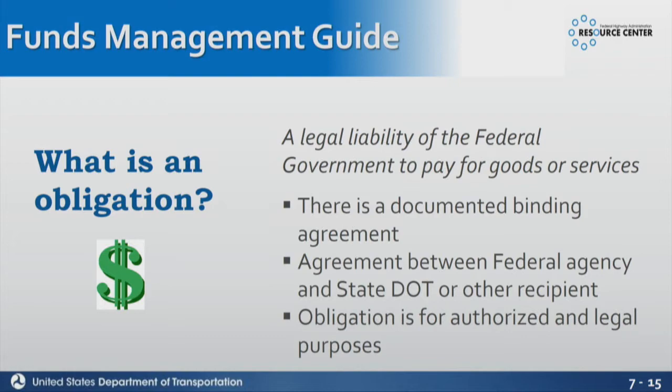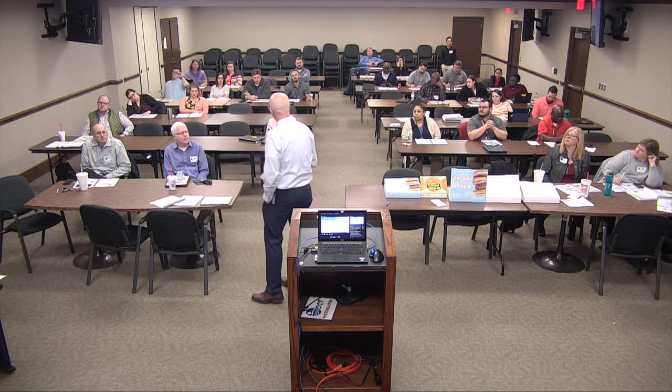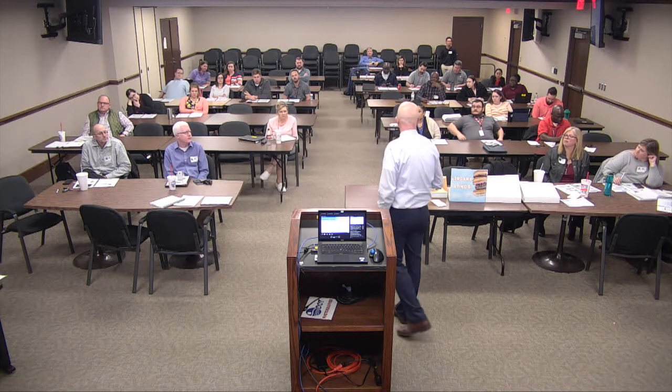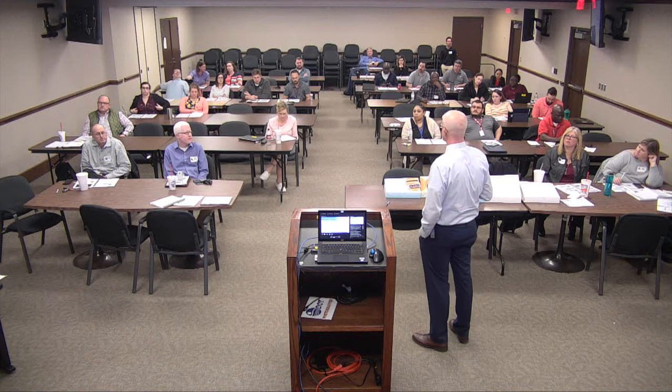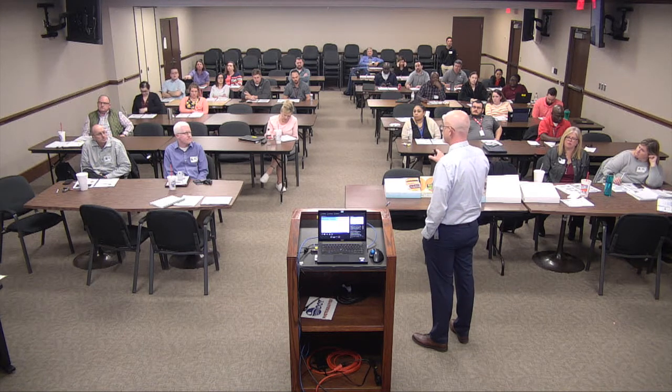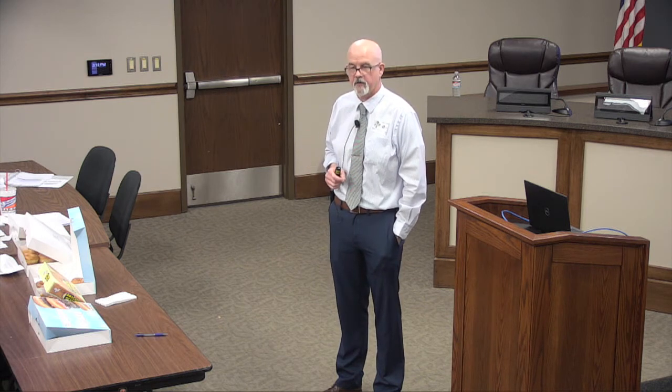I think the question was, where should the justifications for end dates be captured? And that can just be put into the remarks field of FEMAS. So when they send over something, they should adjust the end date to whatever it needs to be, and then they should just justify in the remarks field what the justification is. And then you guys, when you're reviewing that and signing it, you can make a determination at that time if you're going to approve it or not.